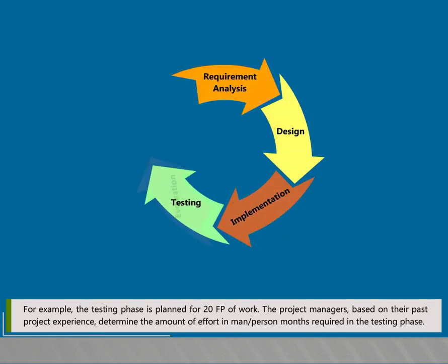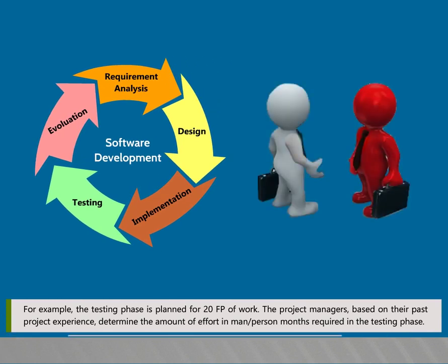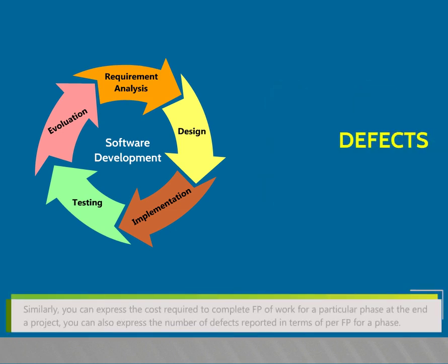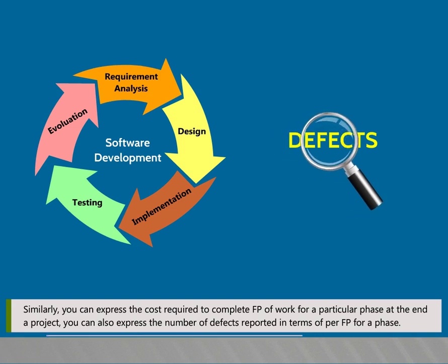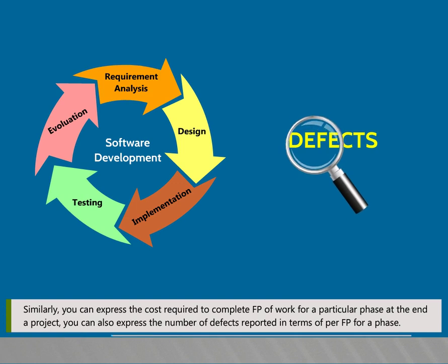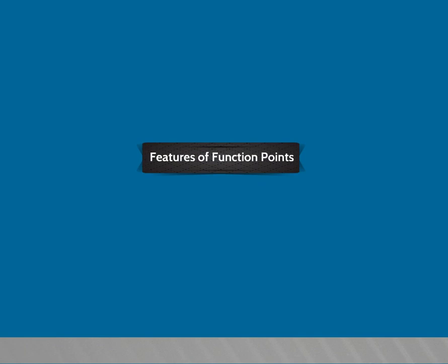They can also be used to estimate the effort, cost, and schedules of projects that use the prototyping and spiral models because such projects have uncertain user and project requirements. To be able to do this realistically, it is important for the organization to have developed similar projects in the past. In addition, you can use function points as a project estimation technique when you anticipate changes in the middle of a project. These changes may disturb the estimates if you had used SLOC to estimate the effort, cost, or size of a project.